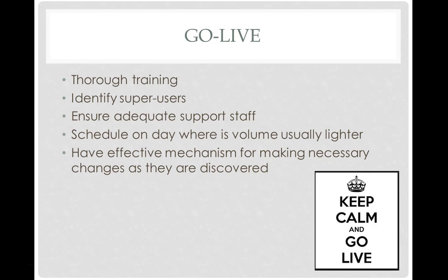So go live is extremely stressful. I've been through a couple. You need thorough training, lots of class time, lots of practice time. Identify your super users, the people that are more computer savvy that can be there to support the staff even after the extra support staff is gone. You want to ensure there's adequate IT specialists, EMR specialists during the go live, and do it on a day where volume is usually lighter.